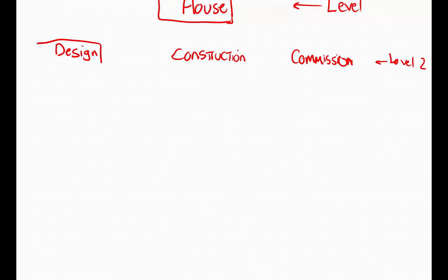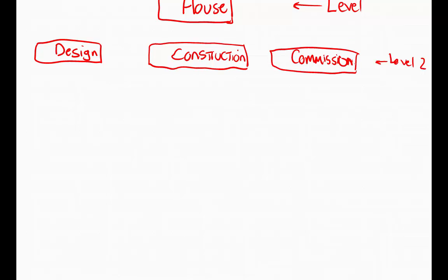Just going to put a box around each of these deliverables as we build out our WBS. So WBS is a hierarchical breakdown of the work required on your project. So far in this project, we have three main deliverables that we're working towards achieving. The next level in a WBS would be your sub-deliverables. So sometimes the project is large enough that you can have sub-deliverables for each of these main deliverables. Carry forward with that example.